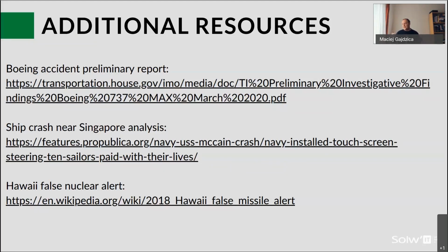So every time during the development we see some things that may go wrong, we can add them to some list, and then we should discuss in some kind of meeting what the possible consequences of this risk are. Should we take any measures, and which measures are enough? And we should document this and have some kind of risk document pointing out all of the risks that were identified and considered.